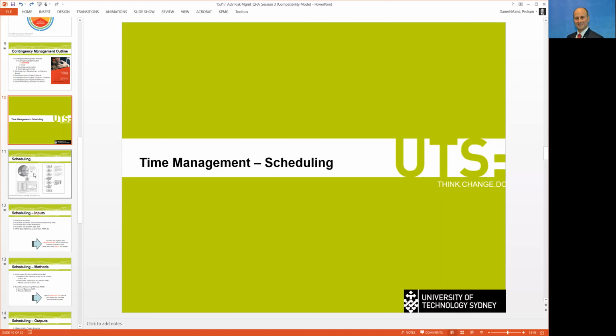If you're developing the schedule yourself, there are some references that you need to refer to, like the PMI scheduling standard, or a couple of other good standards that can help you develop a schedule properly. If you're given a schedule to do the schedule risk analysis, then there is a process in place that you need to go through. Generally we have a schedule health check through 3 steps of checking: contractually, checking the integrity of the schedule, how good it is logically, and so on, and in terms of the structure as well. So there are 3 elements, but we will get into that shortly.